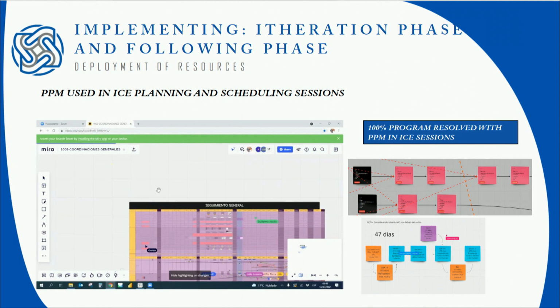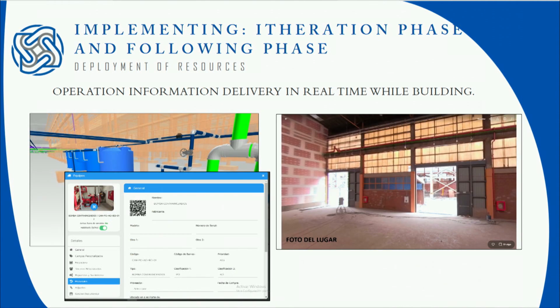So within this, we were able to manage about 32 to 35 people working at the same time, with 2 facilitators for this, and 2 translators for the process into Gantts, because the client understands Gantts. You don't go with the process to a client. It could cause a heart attack to him. So he needs to see Gantts. So we have those translators.